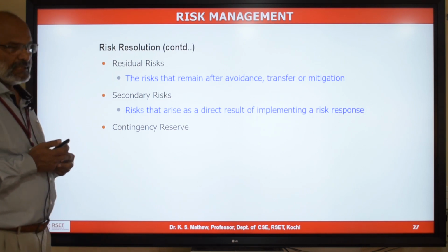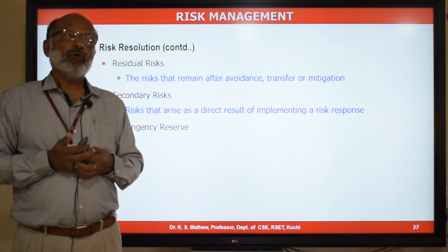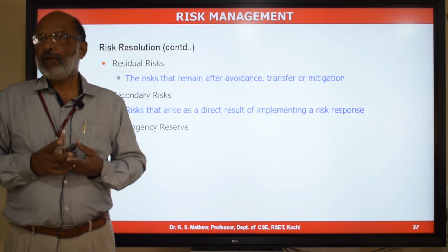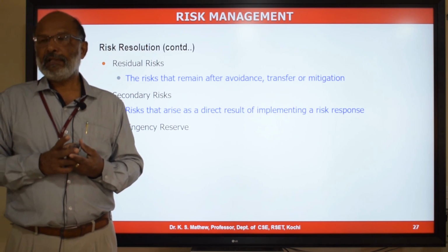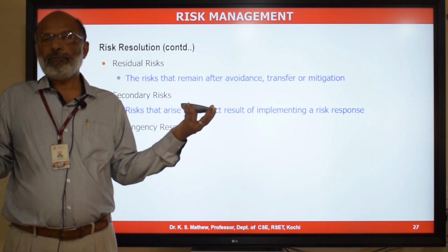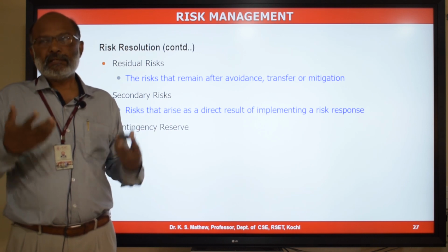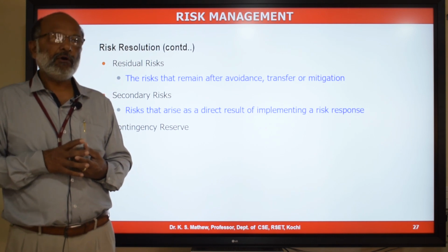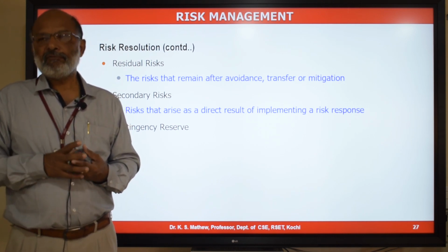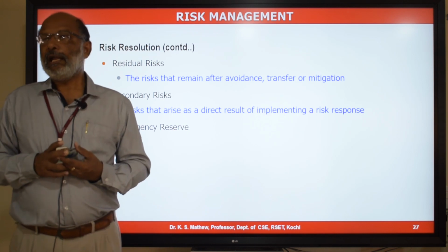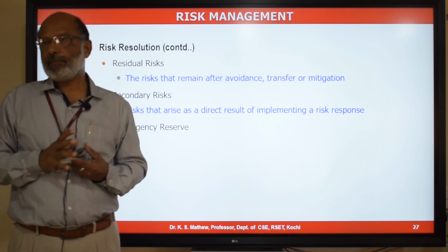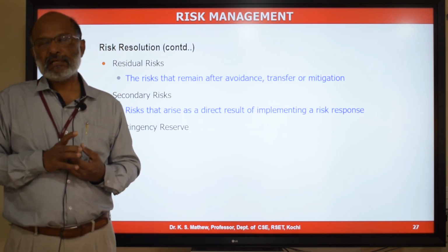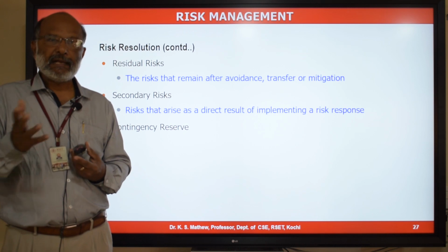Now contingency reserve, which I already talked about, is for all the accepted risks. Some of the risks you cannot take any action on because of the cost involved, for example, weather conditions, a tsunami. You will not be able to plan any action, right? Those risks you will be accepting as they are. And for addressing such risks, you will have a contingency time or additional budget kept aside. That is called contingency reserve, which is normally kept within the budget of the project. Hence, the project manager will have the authority to utilize the contingency reserve if that contingency situation arises in the project.